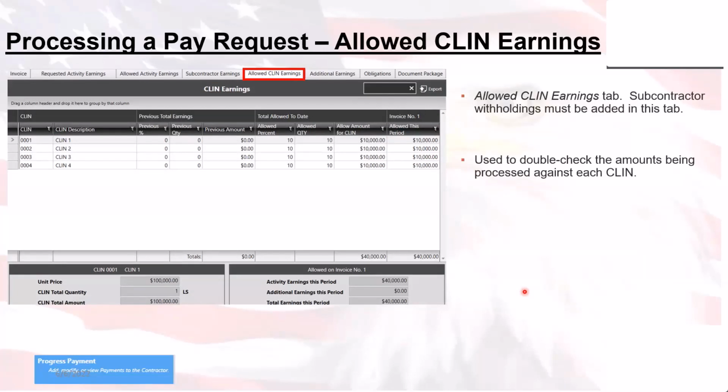You as the government deal with the line items, and then those line items match up to obligations and CFMs. CFMs, of course, is Corps of Engineers Financial Management System, right? So that's where you have the system of record for that. That's when they cut the check and pay the contractor. RMS links up with CFMs and will send this invoice to CFMs, and it can be approved in CFMs, and then the contractor will be paid.